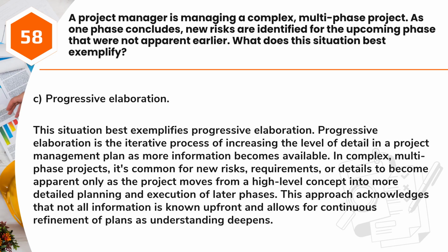Progressive elaboration is the iterative process of increasing the level of detail in a project management plan as more information becomes available. In complex, multi-phase projects, it's common for new risks, requirements, or details to become apparent only as the project moves from a high-level concept into more detailed planning and execution of later phases. This approach acknowledges that not all information is known up front and allows for continuous refinement of plans as understanding deepens.